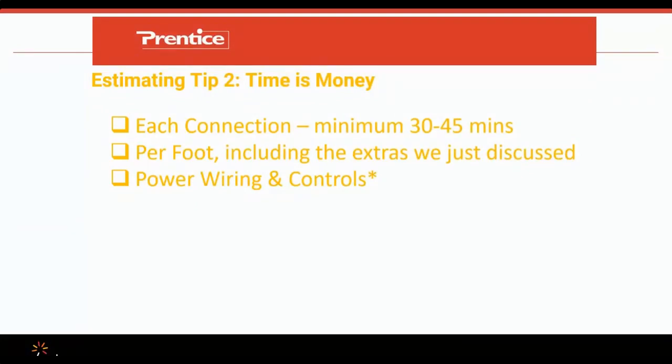Your end seal is a pretty quick, easy installation. So is it going to take 30 to 45 minutes? No, of course not. And as your guys get more experienced, is it going to take them 30 to 45 minutes per every connection? No, of course not. But this is what I recommend as a very minimum value, so that you're covered in your estimate. The next thing is the extras that we just talked about.